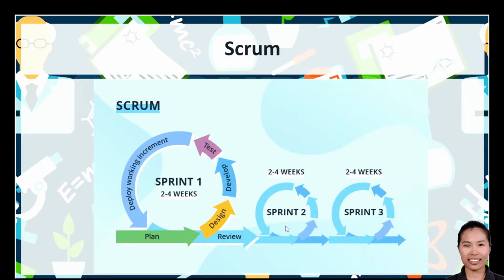So this is Scrum. This is probably the most popular agile model nowadays. The iterations or sprints, as it usually called, are usually 2 to 4 weeks long and they are preceded with thorough planning and previous sprint assessment. No changes are allowed after the sprint activities have been defined.